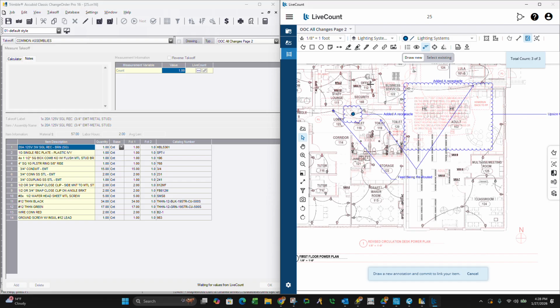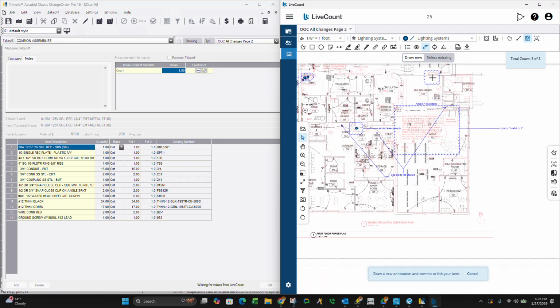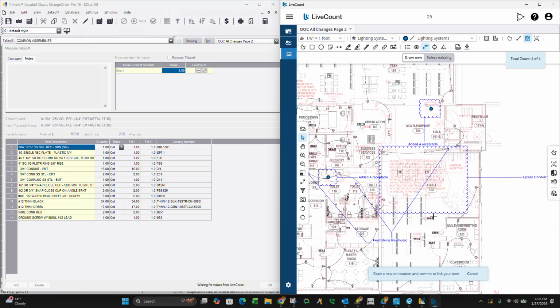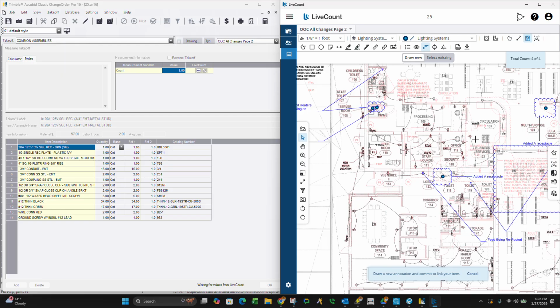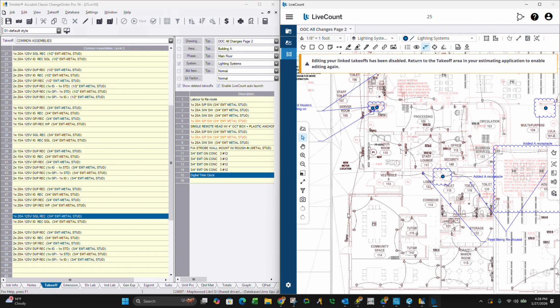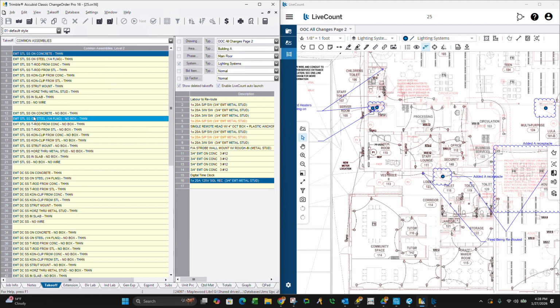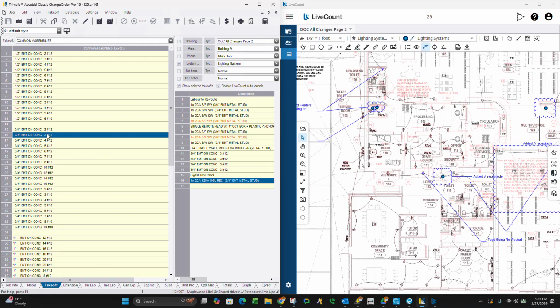I didn't include all those other receptacles because I went over that in the other video. They're just being rerouted. So all I'm going to do is factor in time for rerouting conduit. And we have to upsize this conduit to 1 inch going into this thing. So we're going to add some 1 inch on that. First things first, I'm going to add some EMT. Same thing.